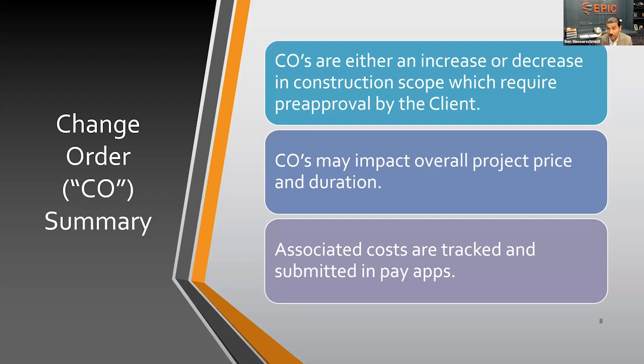The first item that you're going to see, in all likelihood at some point in time, is going to be a change order. I might call it a CO, or if it's a potential change order or proposed change order, it would be a PCO, meaning that it's proposed but has not yet made the transition from PCO to CO. CO would be actually on the books. So here's just a quick and easy summary, just to let you know some high points about change orders.